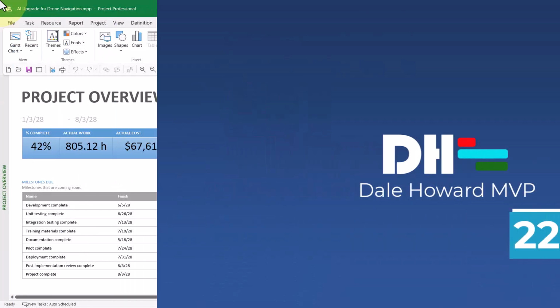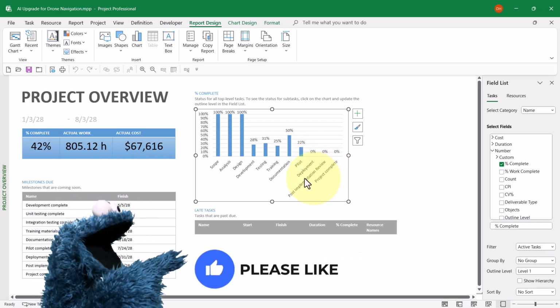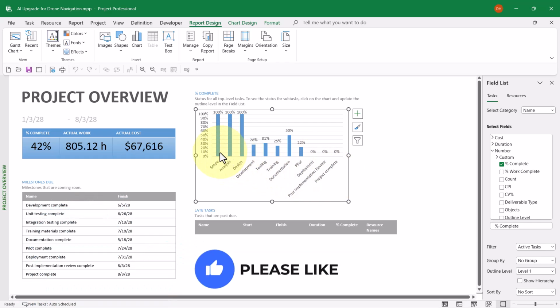And then finally at the bottom, there's a Sort by Pick List button, which offers a few sorting options as well. The editing I want to do with this chart will be to replace the % complete value for each of the Level 1 summary tasks, and then replace these with the total amount of work and baseline work for each of these summary tasks.